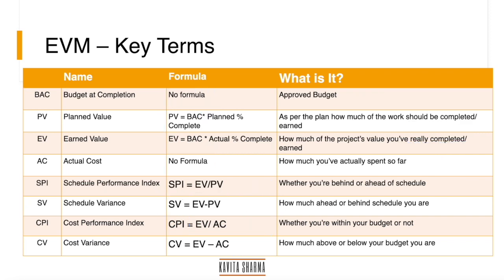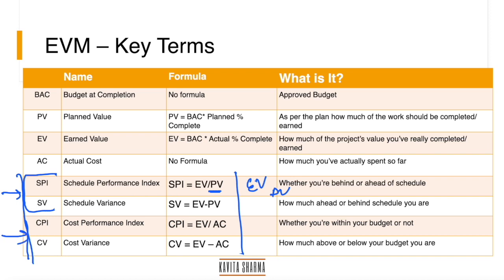To remember the formulas: EV always comes first. When dealing with schedule, pair EV with PV. When dealing with cost (CPI or CV), pair EV with AC. When you see 'index,' use division; when you see 'variance,' use subtraction. So: SPI = EV ÷ PV, SV = EV − PV, CPI = EV ÷ AC, CV = EV − AC.